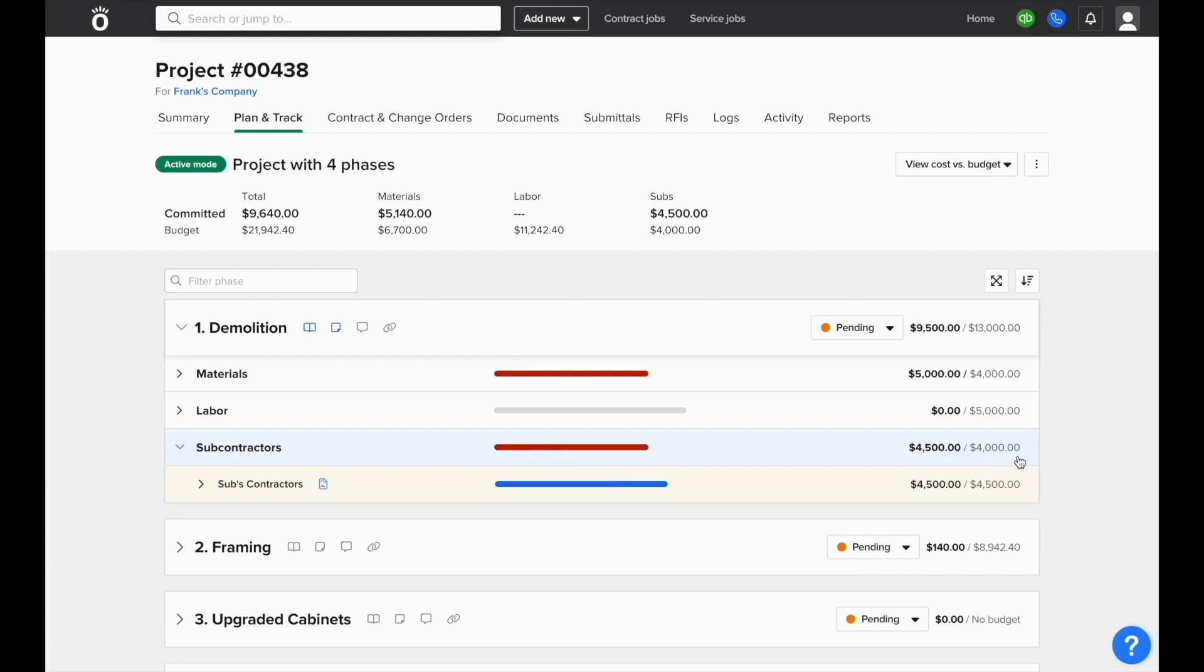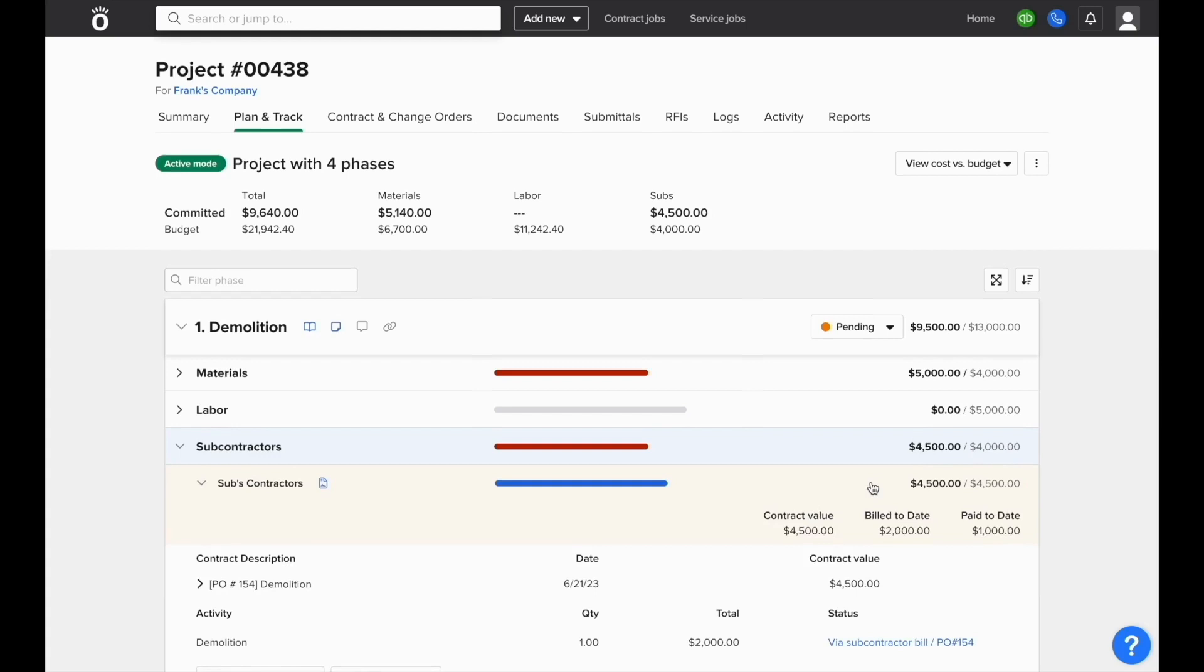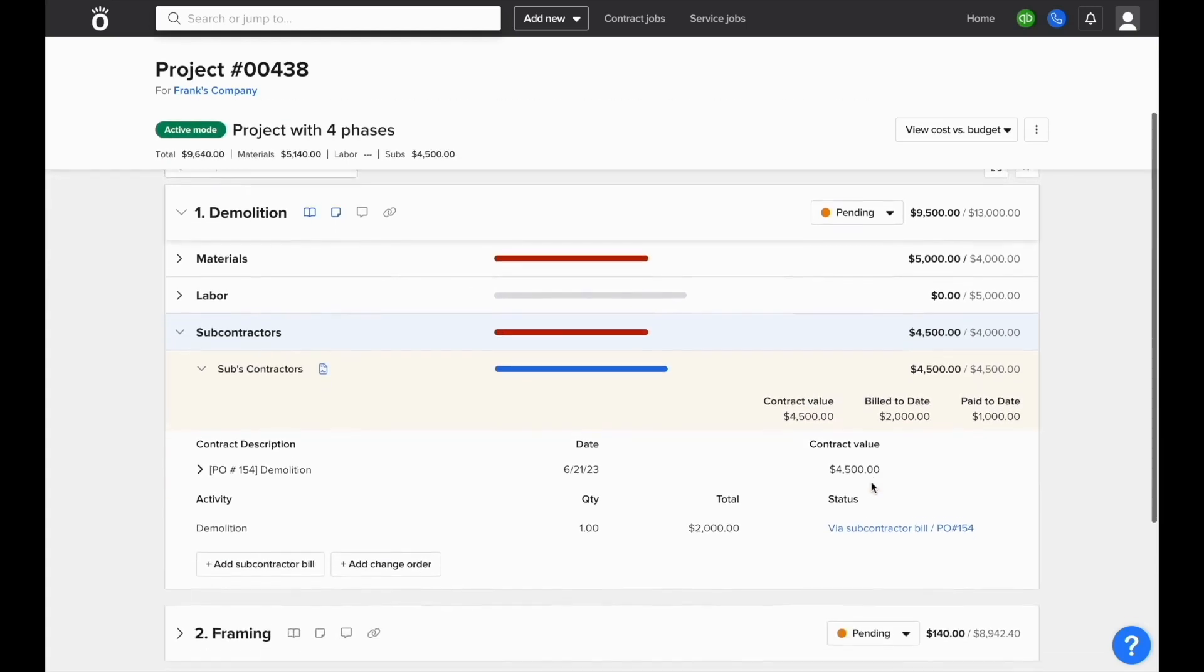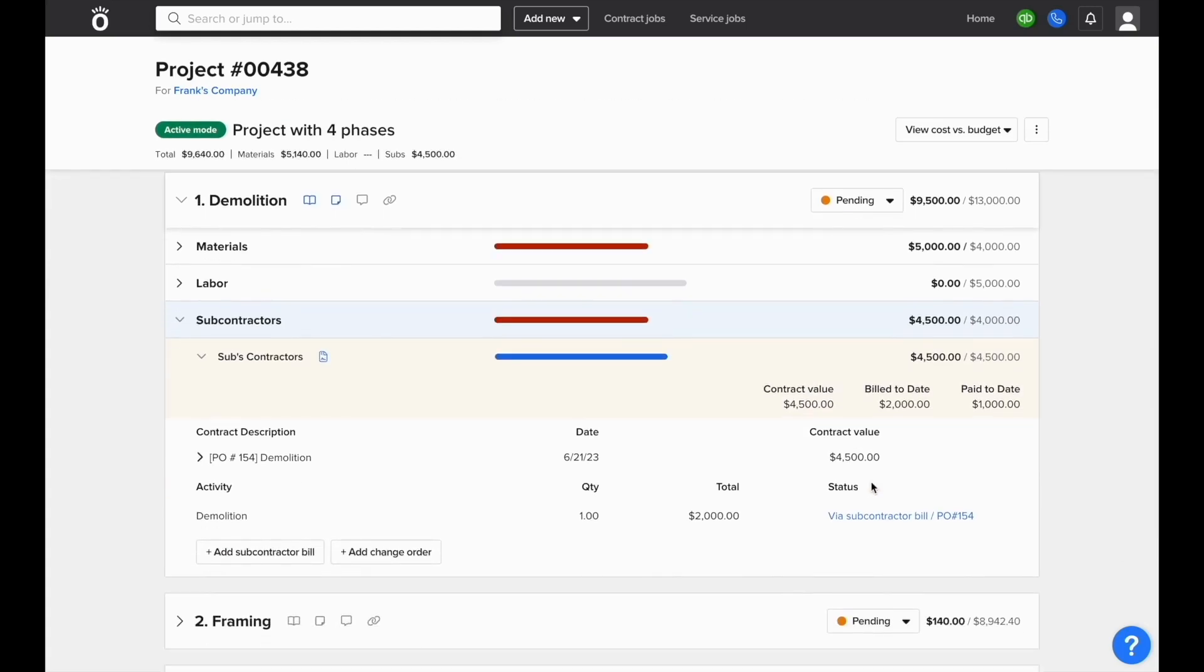We can see our current committed cost versus budget. When we expand subcontractors, we can see contract value, billed to date, and paid to date.